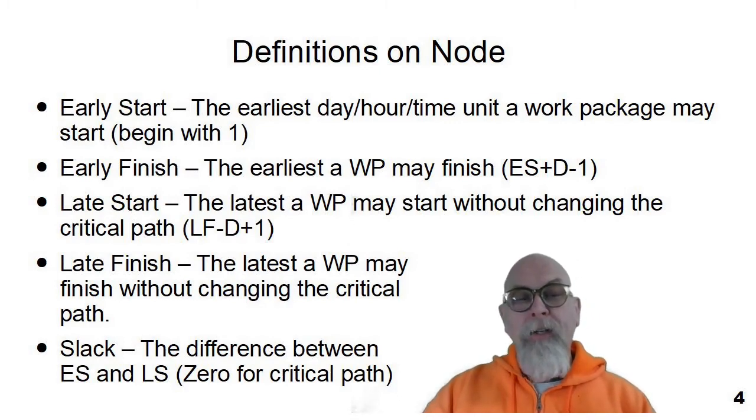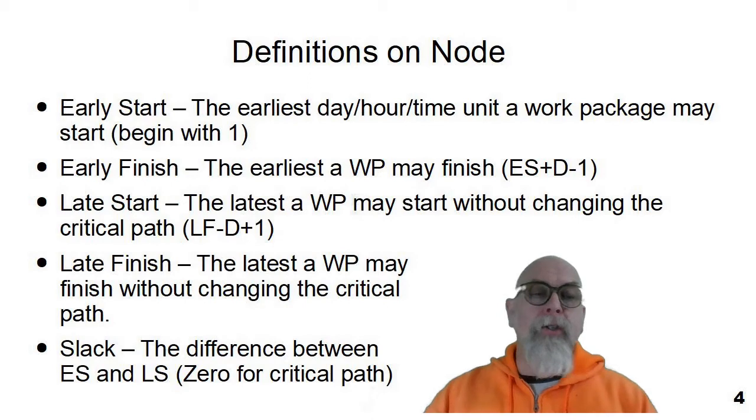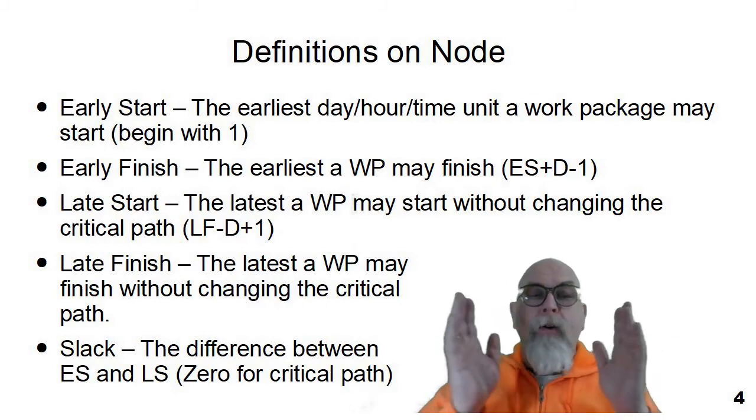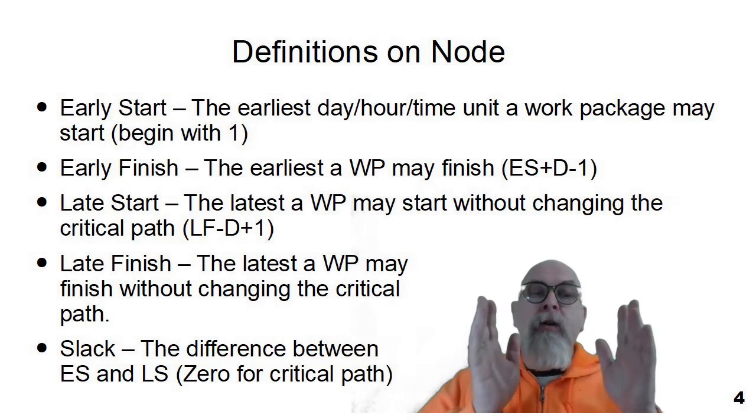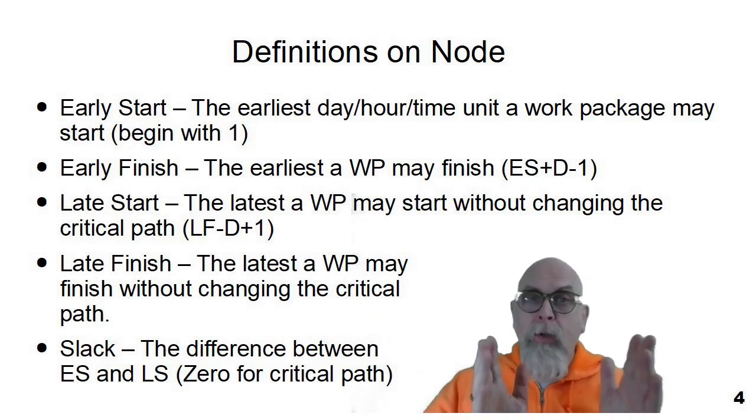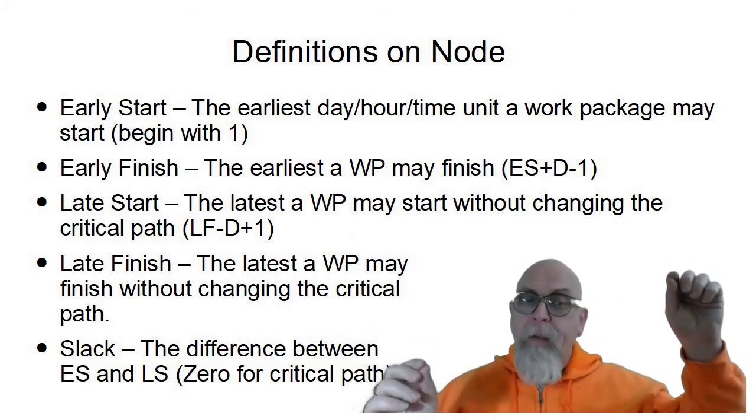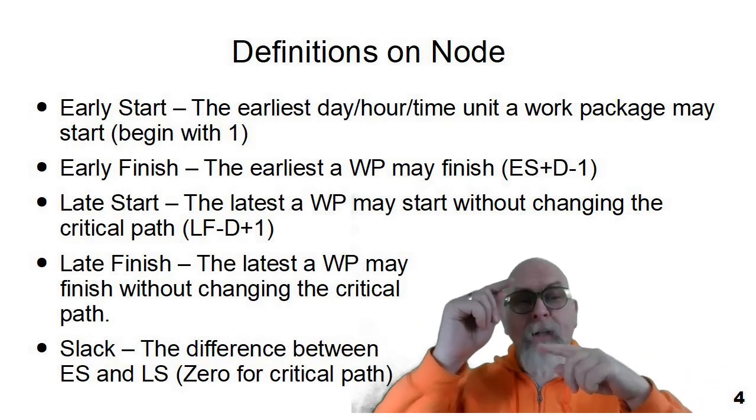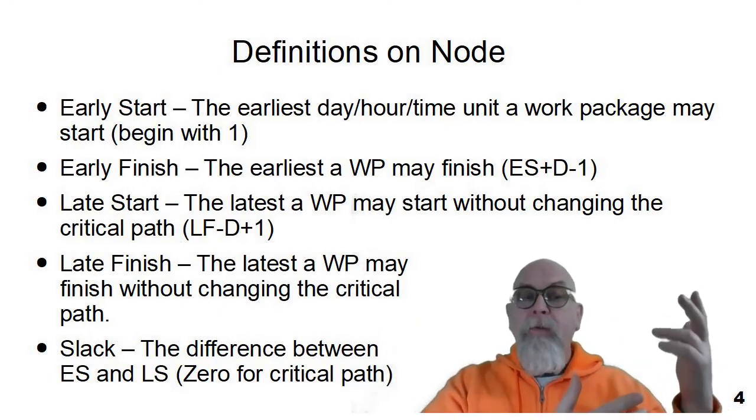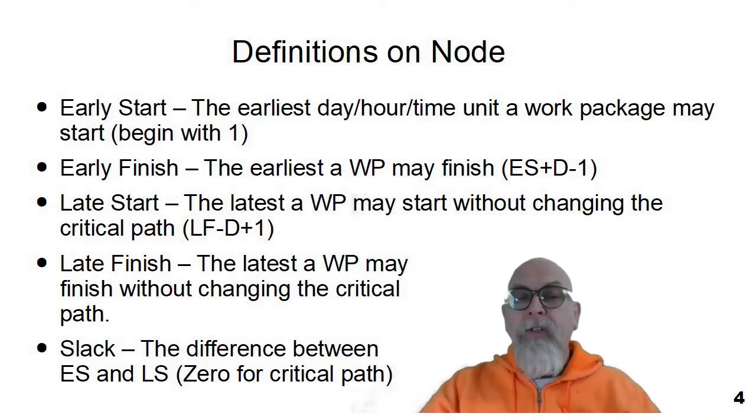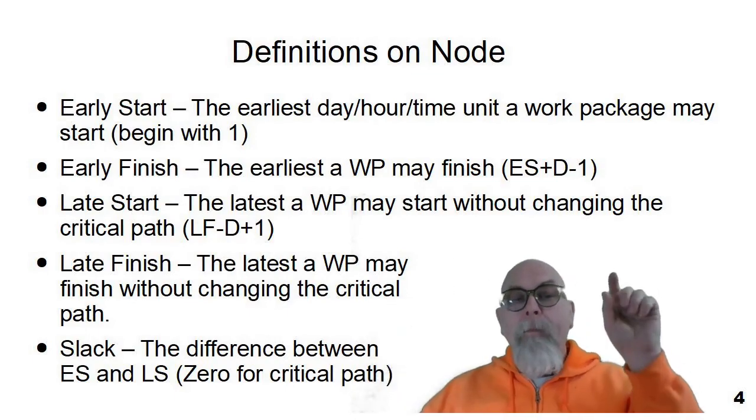The last number on the chart, the one in the bottom center, is something we call slack or float, and both are used in industry a lot. Slack is basically the difference between early start and late start. So it's the number of days that we have wiggle room when we can start that task without messing up our critical path. Items that are absolutely on the critical path would have a slack of zero because their early start and late start, their early finish and late finish would be the same.